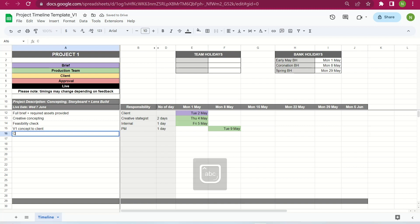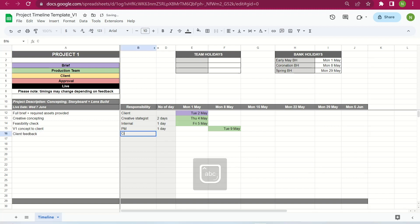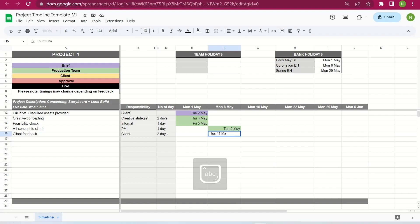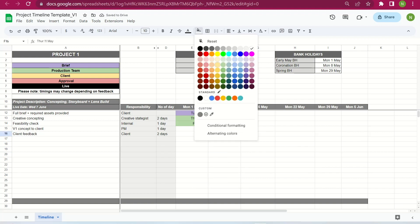Next is client feedback. You want to check in advance how long a turnaround time the client needs — a standard turnaround is 48 hours, which is two days. Depending on the client, they may require longer, for example if they need to share the work with their legal team or a senior team member in a different country with different working hours. Always double check this before completing a timeline. So in this case, client feedback would be due Thursday the 11th of May, and we can highlight that yellow.